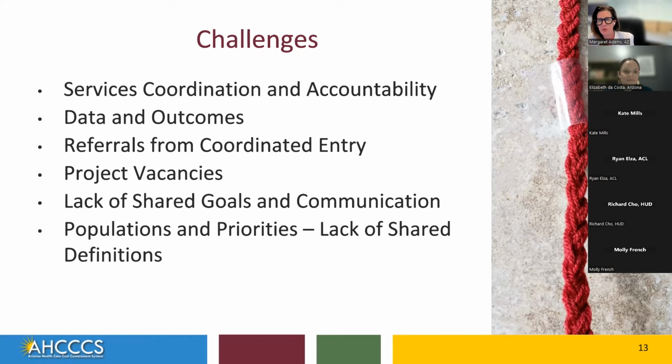We also, as the project moved on, had staff changes and partners were siloing again. We had lags in communication. And so again, without continuing to recenter on that shared vision and goals, there really wasn't a process for us to raise a flag when challenges were coming in from any of the partners. And so that's also something that we're really taking into our next effort.